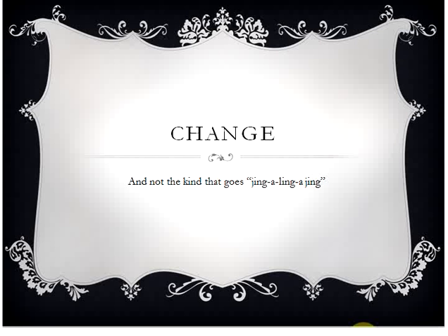Then someone else, like the interface analyst, may say, you know what, that's great, they want to change the name of that form, but they've got an ampersand in it, and the interface won't handle the ampersand. And I could be like, oh crap, I didn't even think about that. So this meeting is at a very high technical level where the final decisions can be made if the change is acceptable and agreeable. The other thing that happens during that technical meeting is an overview of the change calendar